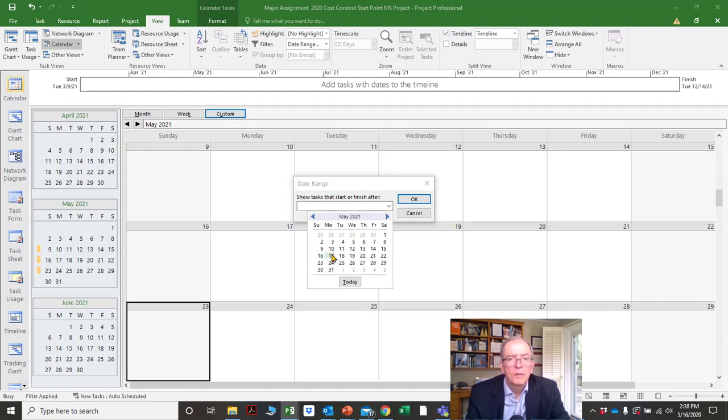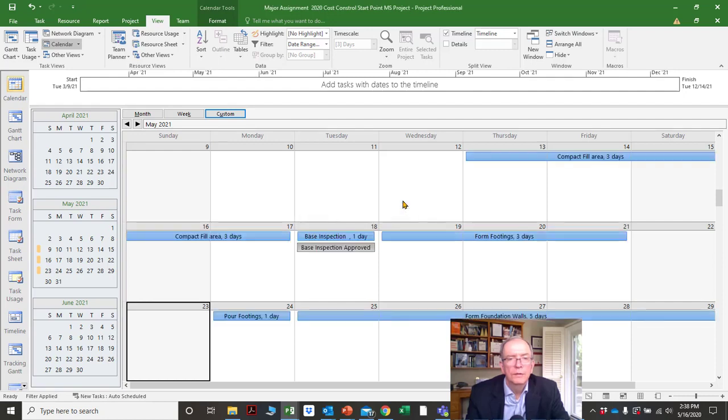So let's see. I'm going to pick May 17th. Click OK. 2021 in this particular case. And I'm going to go back up to here, and I'm going to pick May 17th. Let's go one more week. Oh, let's go to there. Okay. So we've got May 31st. And now it's just showing me that work that's coming up in those 3 weeks, which would be great. So if I'm doing a 3-week look ahead, I could filter the information, print it off. This is what's coming up, and have my discussions with the various trades on that.